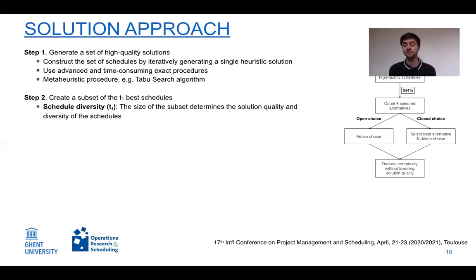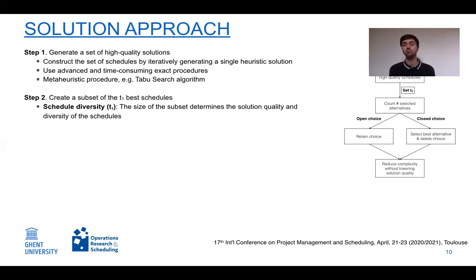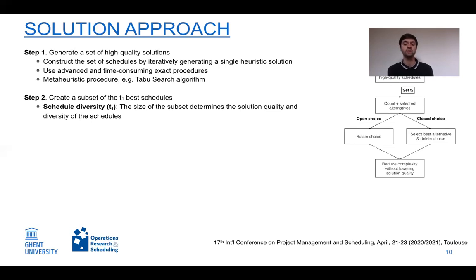In the second step, we retain only a small subset of the best schedules from the initial set. This introduces our first key criterion: schedule diversity, or T1, which is the size of this subset of best schedules. As we include more schedules, diversity between them increases, but overall solution quality in the subset decreases, as each additional schedule has slightly lower quality than those already present.